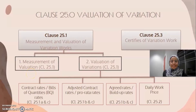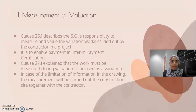Next, continuing with Clause 25 - Valuation of Variation. I am Siti Asma. Here is the summary for Clause 25, covering measurement of valuation, type of valuation, and certifying of variation work. In Clause 25.1, the SO has the responsibility to measure and value the variation work carried out by the contractor in a project, to enable payment in interim payment certification.